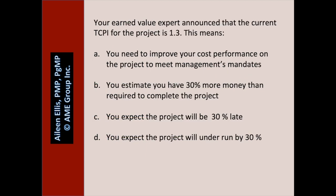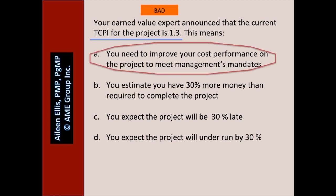Your earned value expert announces that the current TCPI for the project is 1.3. This means — pause the video. A TCPI greater than 1 — is that easy or hard to achieve? It's hard to achieve. A: you need to improve your cost performance on the project to meet management's mandates — A is true; this is hard to do. B: you estimate you have 30% more money than required — B would be a good thing, but that's not what a TCPI greater than 1 means. C: you expect the project will be 30% late — TCPI is about cost performance, not schedule, so C doesn't make sense. D: you expect the project will underrun by 30% — probably not, because our TCPI is so high, which is a bad thing.